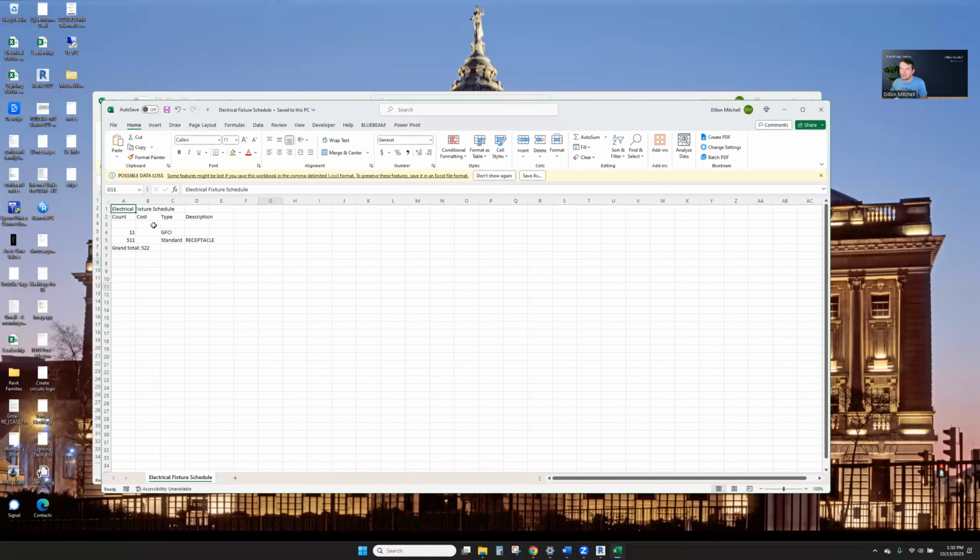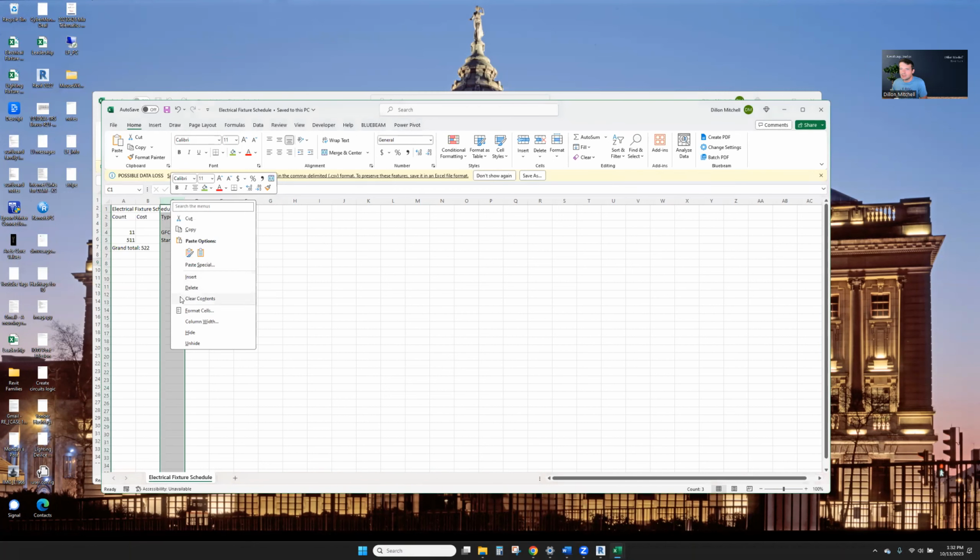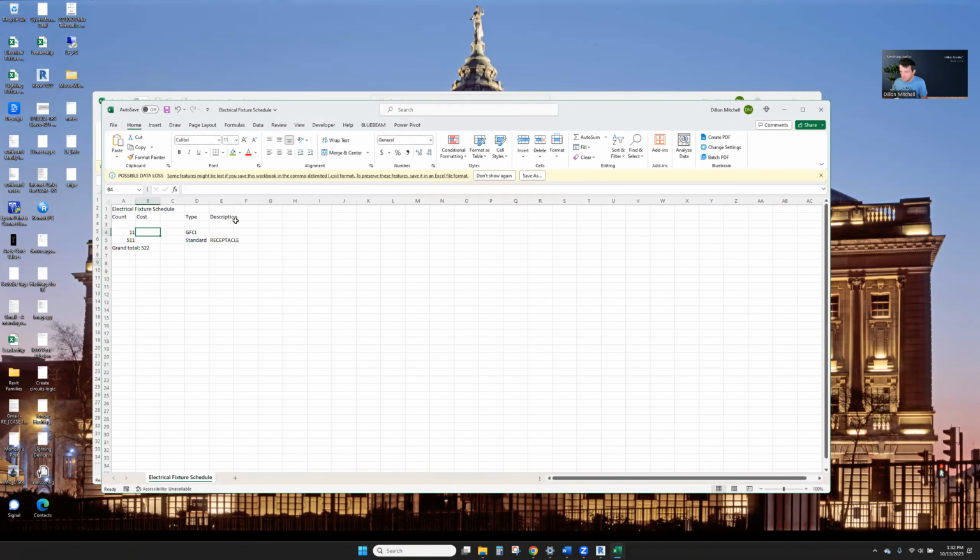Same thing, right? And again, apply cost, total cost, and let's just say that outlet's $20, takes, let's just say, an hour to do total install. So we're looking at, whatever, 125 per outlet to put in. And that's with labor and equipment cost, right? And then whatever your markup needs to be.